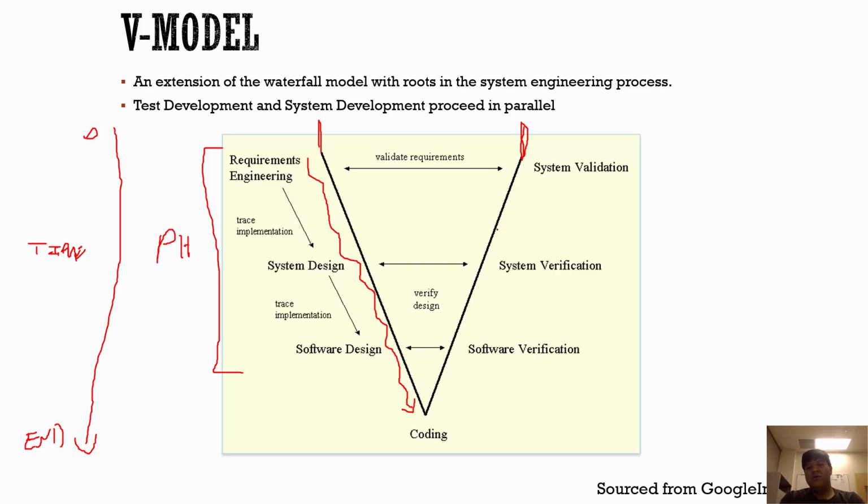While you do systems design, you should also have people that take a look at what that design is and try to figure out how they verify it. What sort of test plans should they put together in order to do that? And again, it's something that happens in parallel. As you design your system, once you have some stuff there to work with, you can pass it off to somebody else, and they can get started with some ideas on how to validate this thing,